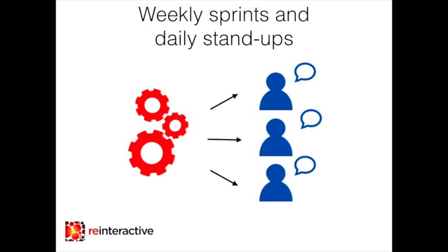Because if they're seeing things aren't progressing as quickly as we'd hoped, then it gives you an opportunity to either de-scope functionality or reprioritize functionality or simplify functionality, and it's really important to have that constant communication. And super important to have the project owner at those meetings.